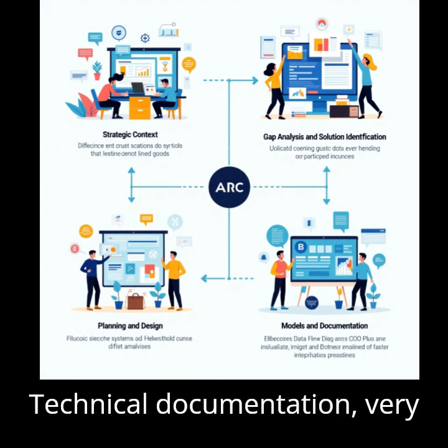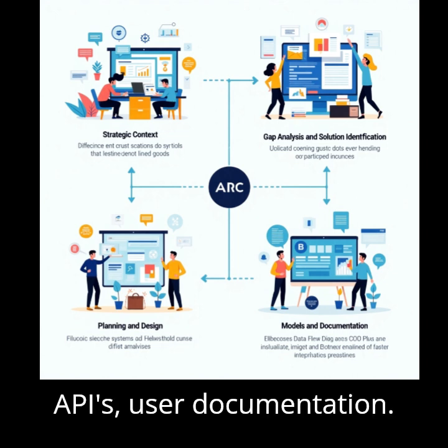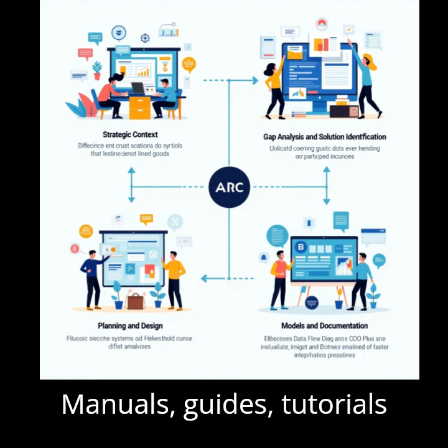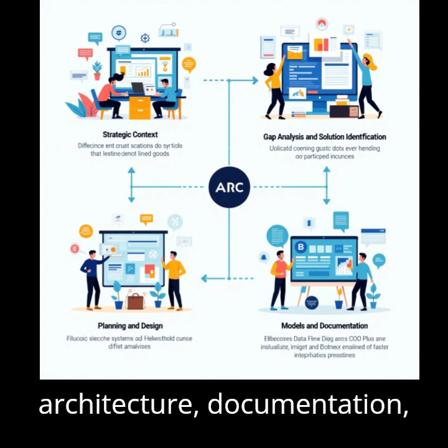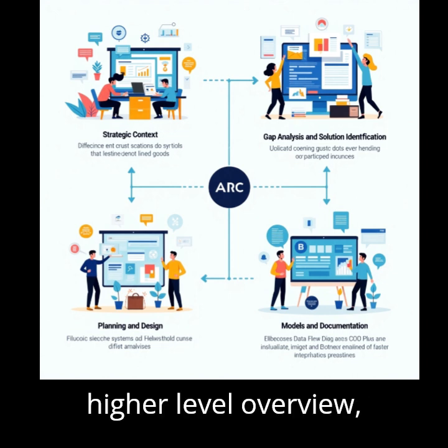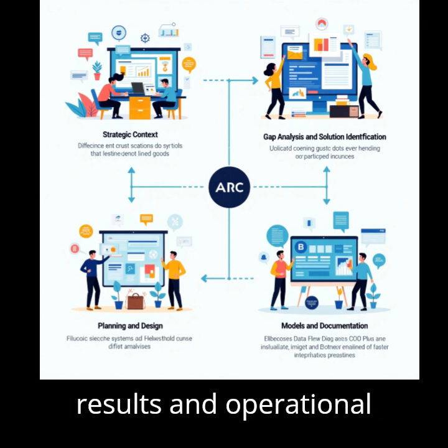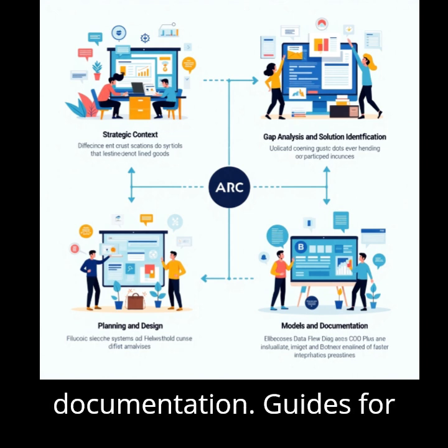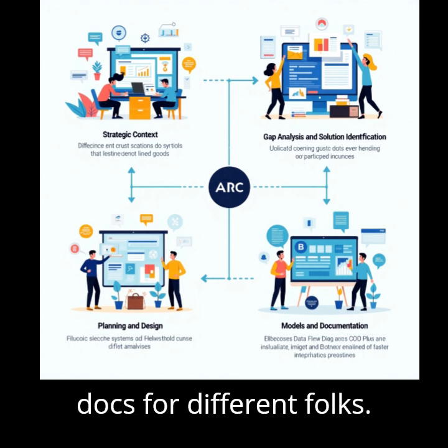Technical documentation for developers, covering architecture, code details, APIs. User documentation, manuals, guides, tutorials for the end users. System architecture documentation, high-level overview. Quality assurance documentation, test plans, results. And operational documentation, guides for running and maintaining the system day to day. Different docs for different folks.